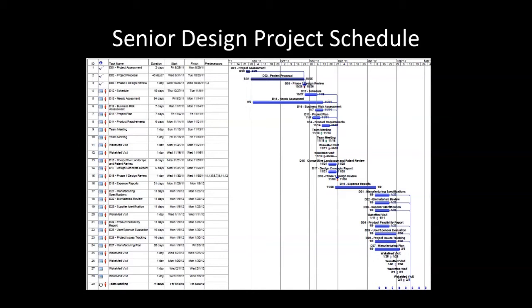And what this is showing is that some of these events are interrelated to each other. One event might depend on another event in the schedule occurring before or after or even during the same time. So the schedule shows some elements, most of these elements occurring in parallel where there's overlap in terms of when these projects are being done. And there are other parts in the project towards the bottom that really are done after the first steps are taken and completed by the team. So it's a combination of both waterfall and the parallel concurrent project scheduling approach.